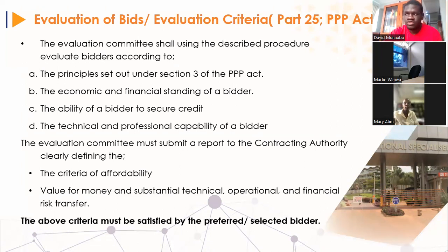There are key things to consider. Number one, whether the bid is in line with the principles which are set out under Section 3 of the PPP Act, whether the bidder has the economic and financial standing to manage the project, saying that these are actually projects which need a lot of funding, and whether the bidder has the ability to secure credit from different financing institutions, and whether they have the technical and professional capability to implement the